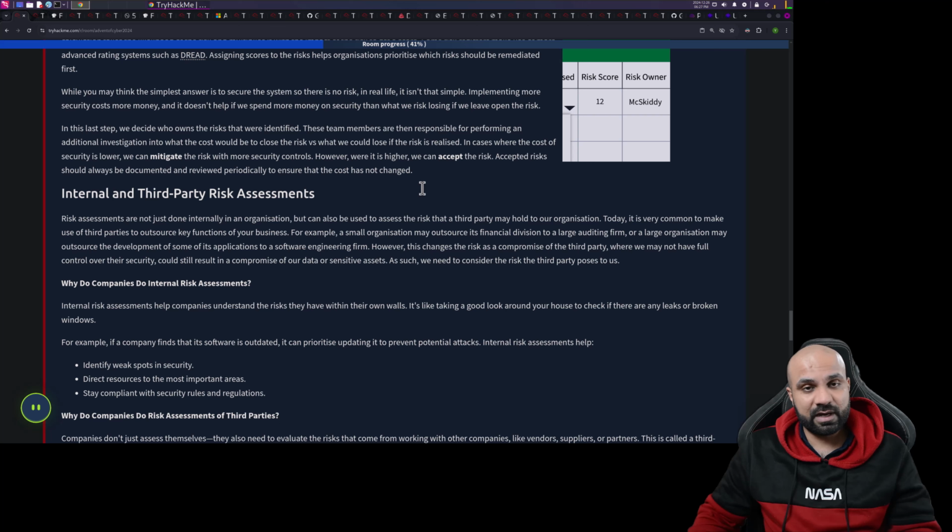Okay, so in this case it is not feasible to secure or mitigate the risk because there is no value in doing so, as there is a big difference between 60,000 and 10,000. That means you will be losing 50,000 per year of the money. So it is not worth mitigating that particular risk. Depending on the finance and the money, we can either mitigate the risk or leave it open or minimize it or transfer it to somebody else.